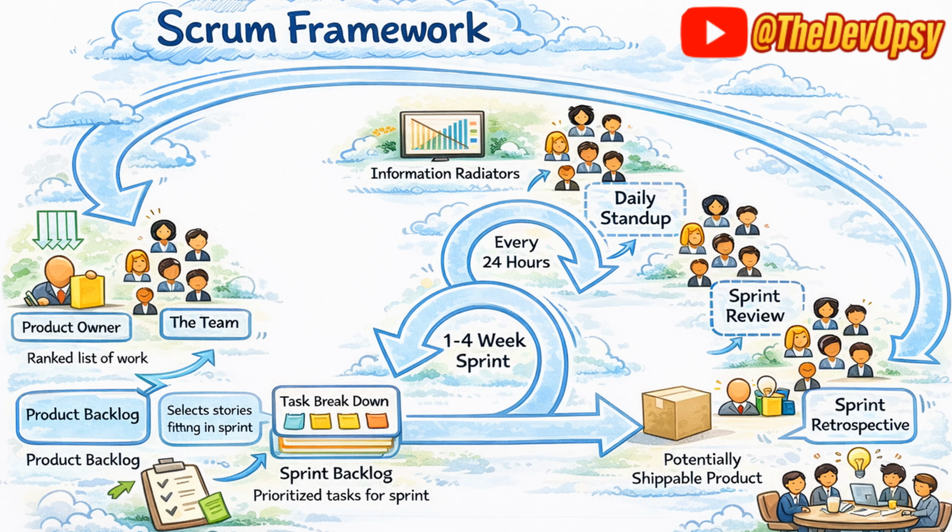Ideally it is advisable that it should not go beyond 4 weeks, otherwise it becomes waterfall, right? If you're delivering after a few months, then what's the point? So within 4 weeks it has to be. Then you will have daily stand-ups every 24 hours at the same time, at the same place. So one suggestion: daily stand-up is not a PM or any manager asking the team what they did. Daily stand-up is the team coming and sharing what they did today, what they are planning to do tomorrow, and if they have any roadblocks while progressing towards the goal. So we'll talk about those parts as well, but that's what the clarity has to be.